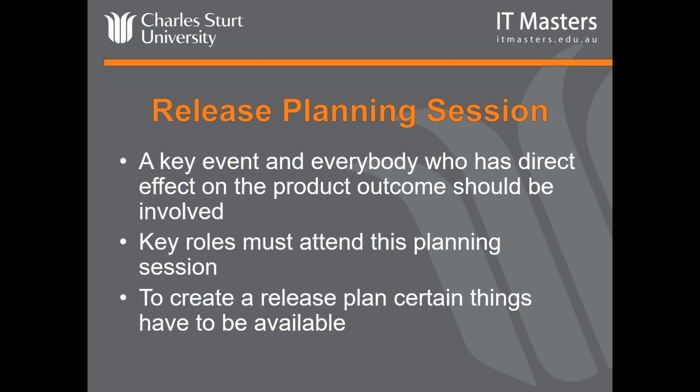Now, Agile projects approach estimation via assessing the features, tasks, user stories using some measure of effort. And the standard effort measures of days and hours can still be used, but many teams use story points. Story points are a relative measure of feature or user story difficulty and complexity. As an example, if one feature was twice as complex as another feature, it would have twice the story points. The use of story points enables the team to separate effort, i.e. how difficult it is to do, and speed, how quickly can we do it.